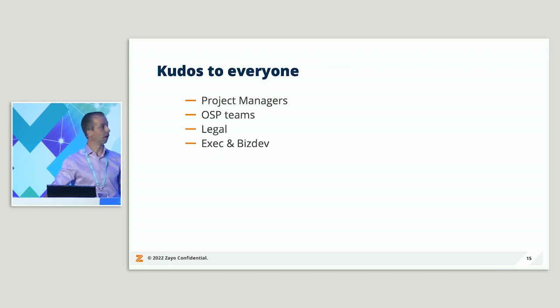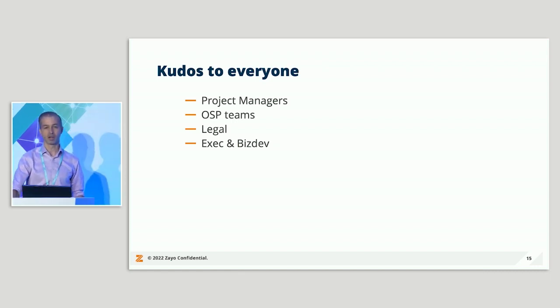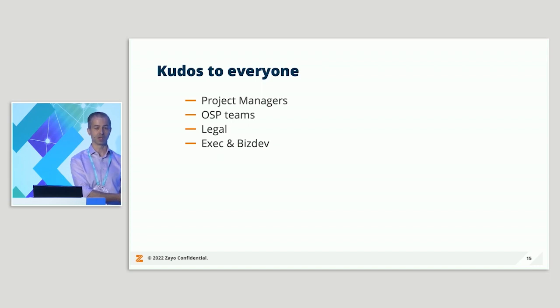All our OSP, our outside plant teams, they're the ones looking after the boat vessels and the cable and fibre manufacturers and so on. But then there's a lot of unsung heroes working right behind the scenes, especially with the legal. The legal teams, we had to enter into 17 different contracts or so just to do this cable. Not just for laying the main cable, it's the shoring vessels, the shoring teams, the fibre splicers at each end.